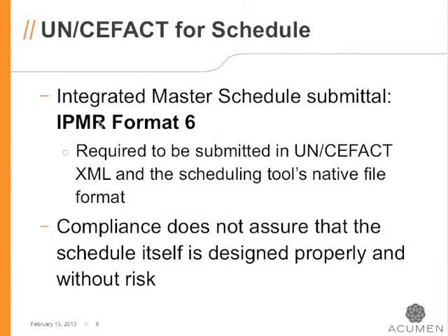Let's talk about schedule. And schedule is one of our top areas of focus at Acumen. The schedule submittal is the Format 6, and you'll see that as you review that IPMR DID. You're required to do two things, in fact. You're both required to provide the CEFACT XML format, and at least for the current time and for the foreseeable future, you will also be required to provide the schedule in its native file format as well. So it's not simply enough to send the XML file. You really do need to send both.